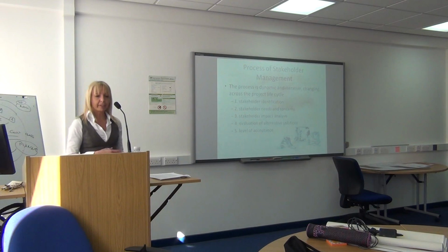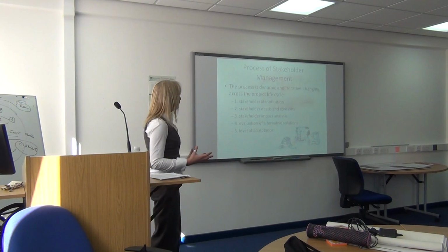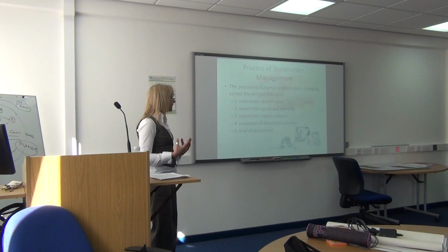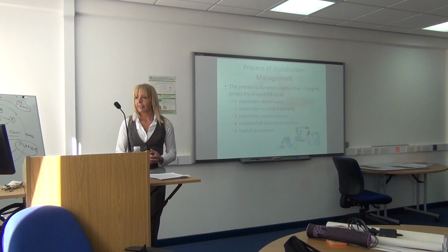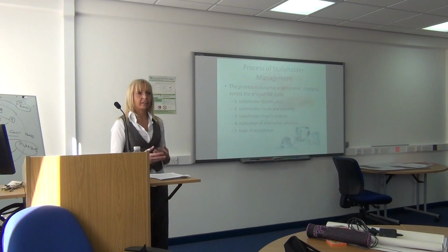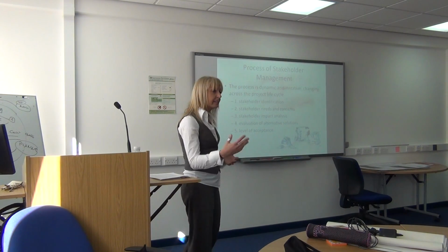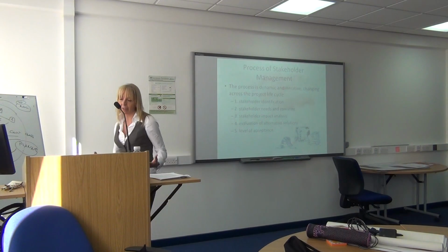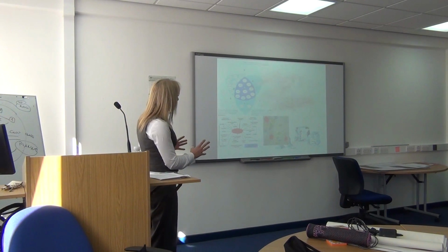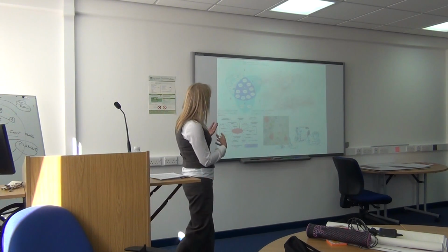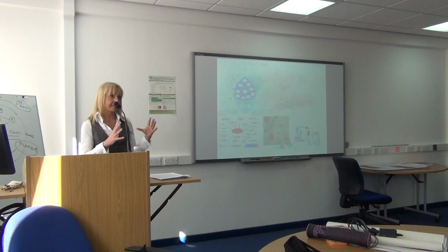So one system of doing this, and this is a very prescriptive approach, is that you identify the stakeholders, you identify the stakeholder needs and concerns, the impact that they will have on your strategy, the evaluation of alternative solutions, and then eventually gaining a level of acceptance. And the acceptance is that of you meeting the expectations that they have, their aims and objectives, their goals. And there's various ways of doing that, and these are just a few of them. And we're going to go through the majority of these actually, but as a process rather than in isolation.